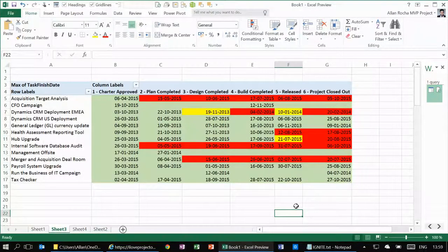All right, so while you were talking, we did this report. So what are we seeing now? We see the dates that we're going to hit all the key milestones, and we've color-coded it red, yellow, green based off of finished variants. This is probably the most fundamental report that most people ask us to do. Any client, any industry, doesn't matter if it's IT, oil and gas, drilling, et cetera. Typically, this is one of the first reports we start with. So that's just creating a very simple major milestone report with one table.